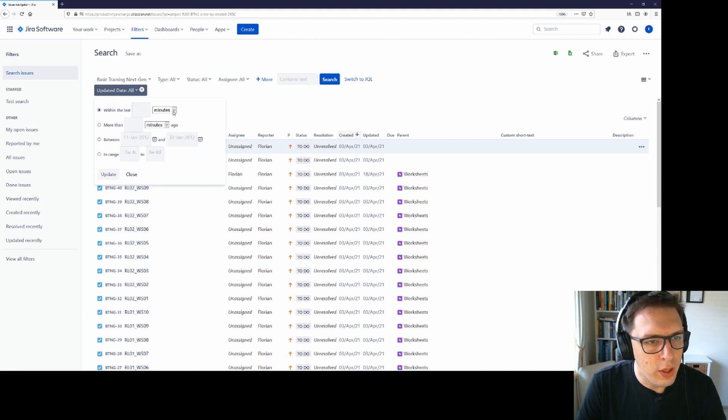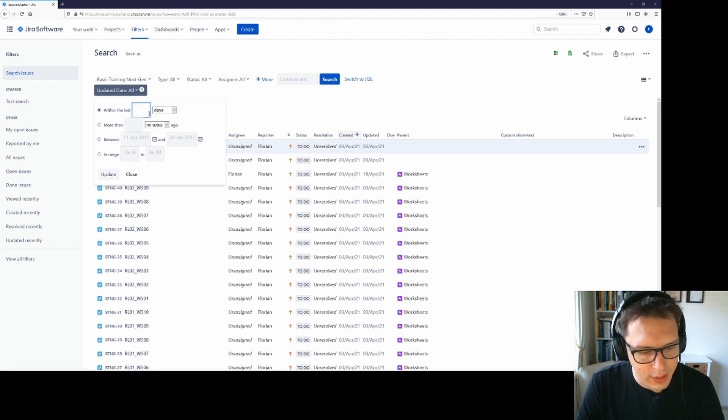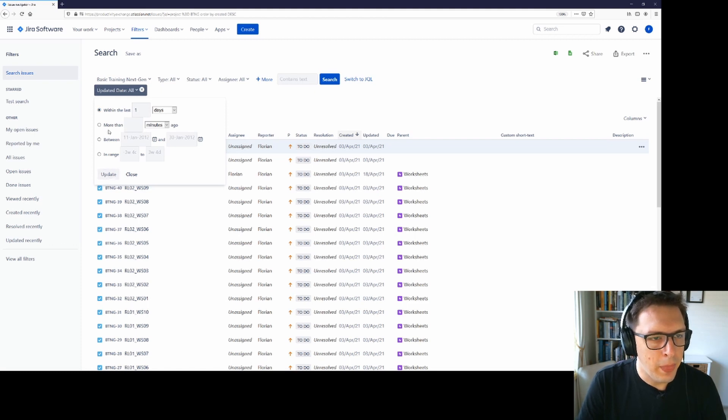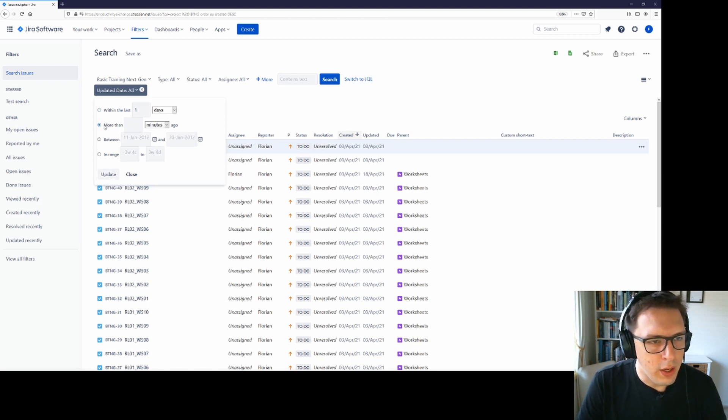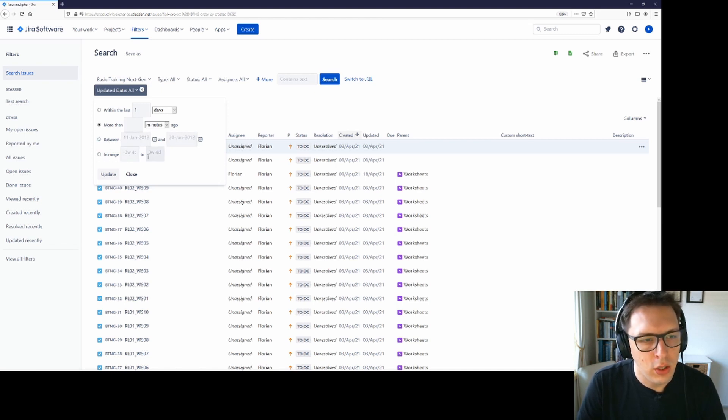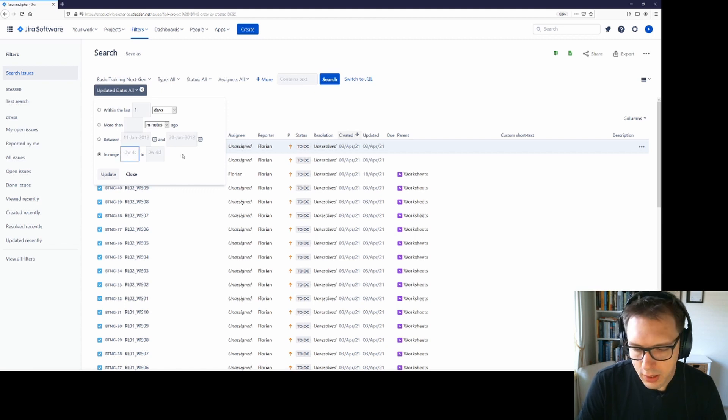This is particularly useful for the updated field because then we can also say we want to look at all items within the last day. So I can see all of the items that are updated in the last day. There are other options to make it either more than X amount of minutes ago or between a particular set of dates or in a particular range.